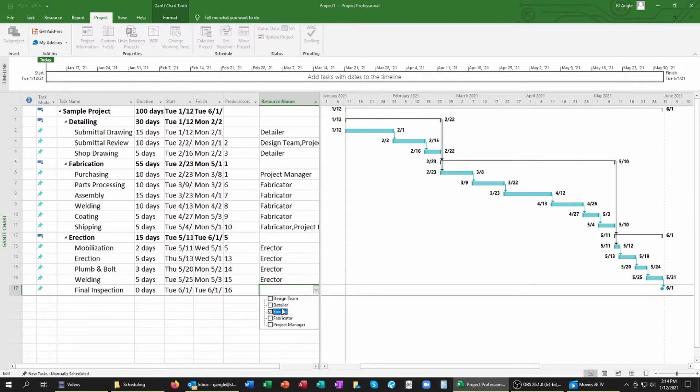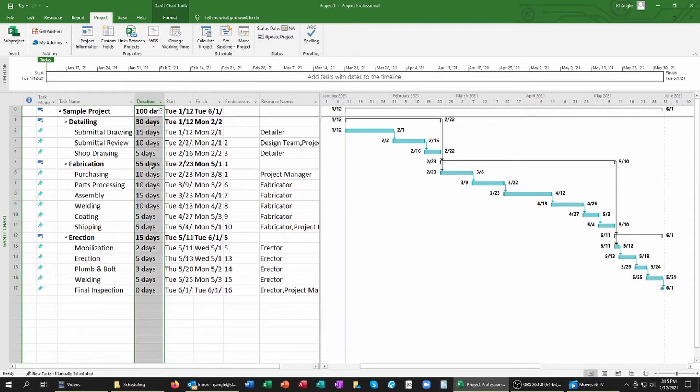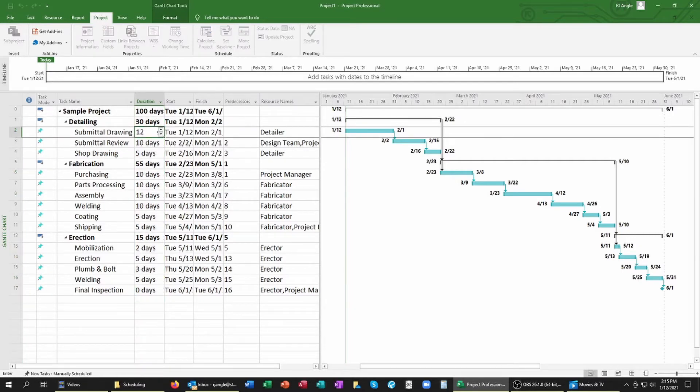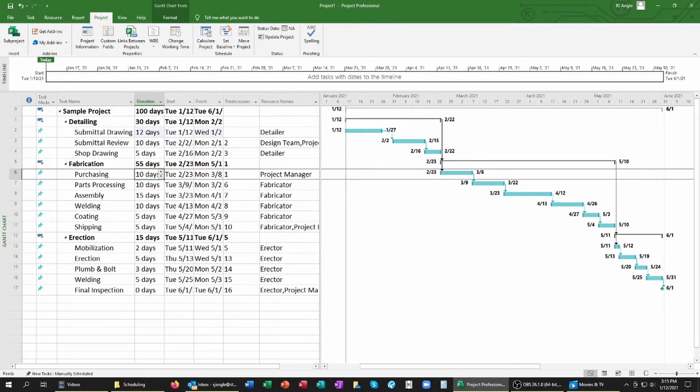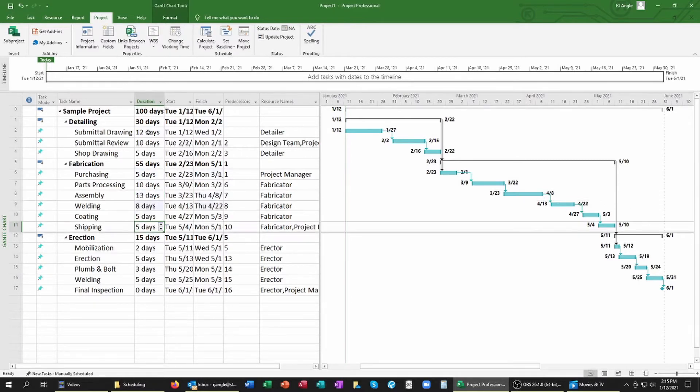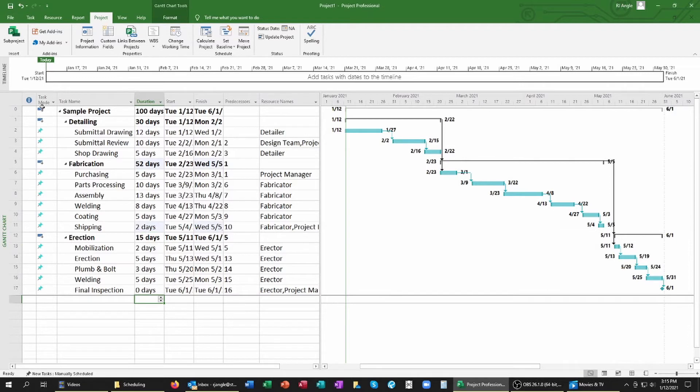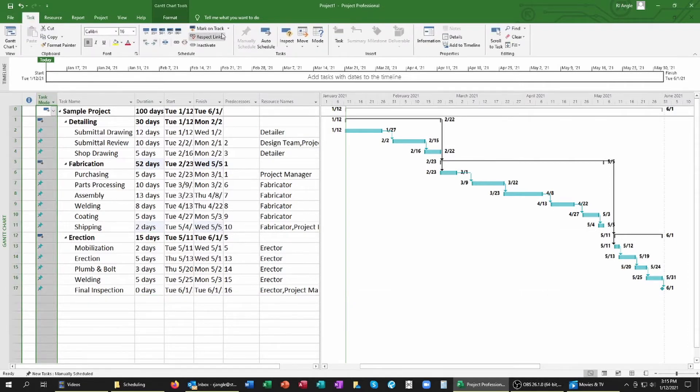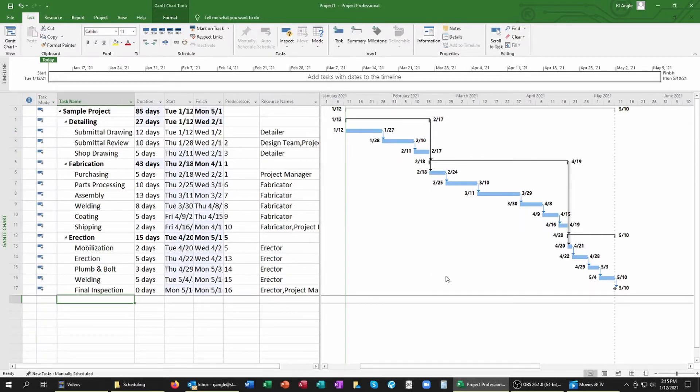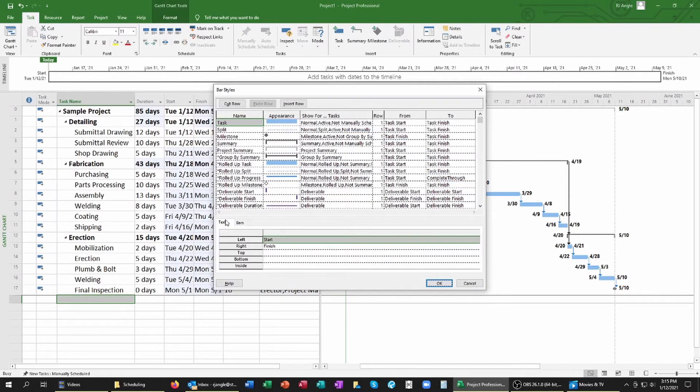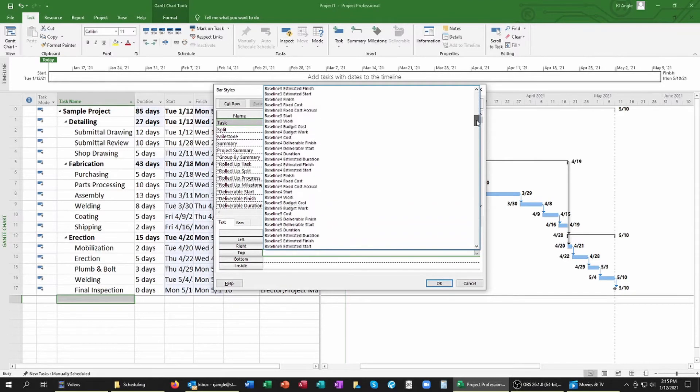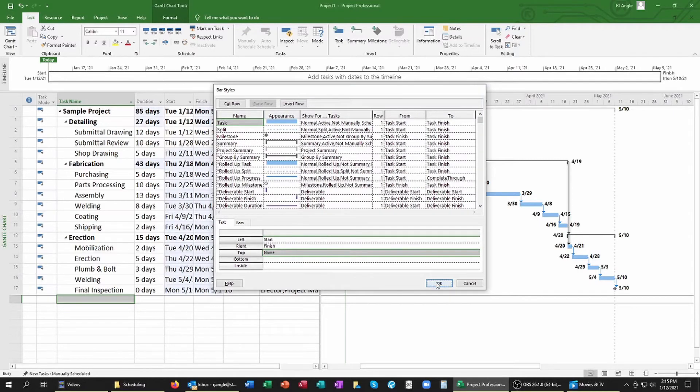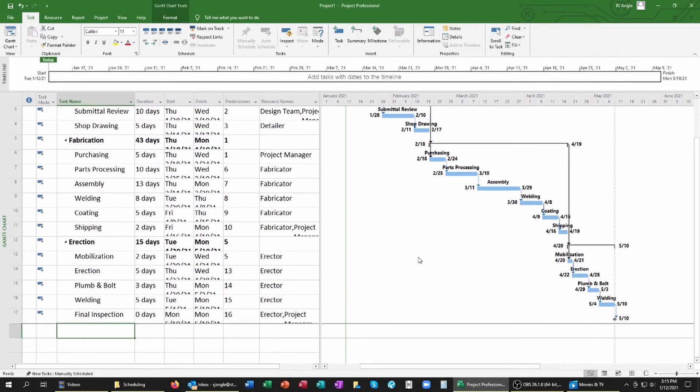If you need to find cuts in your schedule, you really only have three options to make that happen. The first one is to reevaluate your task durations. If you have too much fluff in any one of these and you know that you can get it done faster, well, you need to cut that out. Self-evaluation can feel like suicide to some because you're adding pressure and commitments to your own company. But it's important at this stage that you maintain a competitive mindset. You should focus rather on how well your company can perform, which requires strategy and can even make this process fun. Don't take what I'm saying as a suggestion to try and make the impossible happen. I'm not telling you to disregard the realism of your initial schedule if it is indeed accurate. I'm only suggesting that you reevaluate how much your company can produce in a given time frame when push comes to shove.